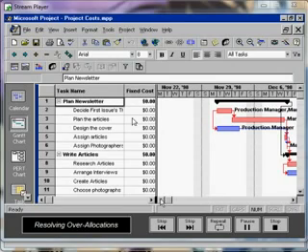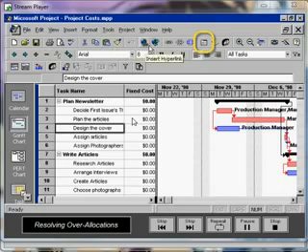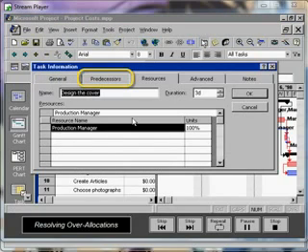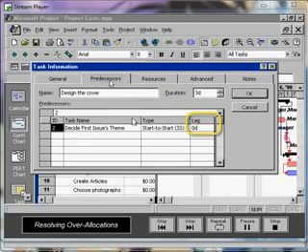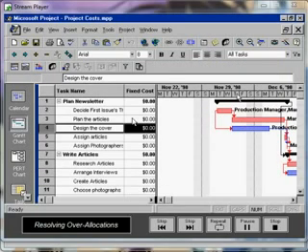In the Task Name field, select Design the cover and click the Task Information button, which is ninth from the left on the standard formatting toolbar. Then click on the Predecessor tab because we have to let Project 98 know that Decide First Issue's theme needs to precede Design the cover. Highlight the Lag cell, type 2D for 2 days, and click OK. This will delay the task Design the cover for 2 days. As the screen returns to the Gantt chart, we can see the non-critical task move forward 2 days, and the over-allocation is resolved.